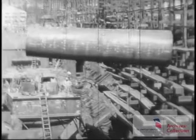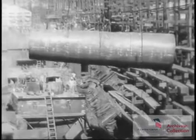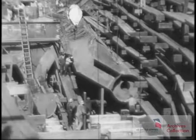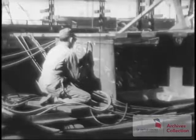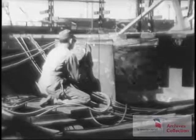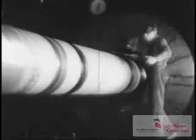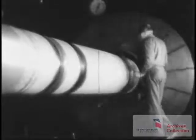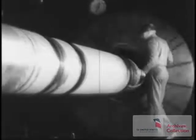Into the ship went 1,500,000 rivets of steel and aluminum, 2,200 major sub-assemblies constructed on shore, materials from 800 companies from almost every state in the Union. This was the basic formula. This was the pattern. The prime requisites were speed, power, and passenger comfort, whether tourists or military.